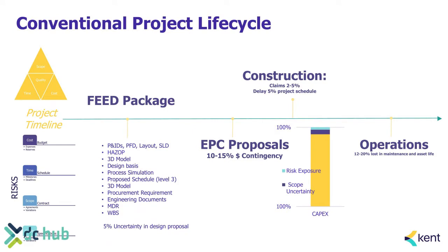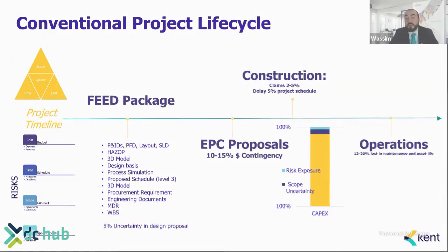And if we take each milestone for the project, starting with the FEED, we know usually the company who developed the FEED use different tools and have different deliverables to deliver, like studies, P&IDs, PFDs, layouts, studies, 3D model, design basis, process simulation, and engineering documents, MDR, WBS. So there really is a big list of deliverables.